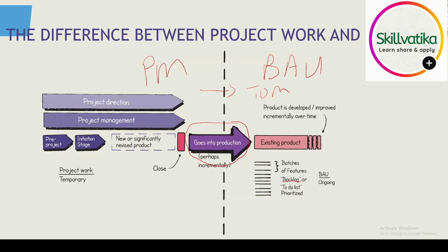If you're a good project manager, your first thing that you want to know is what is it they're trying to do? What is it they're trying to achieve? That's the outcome. What would we be able to provide to them that would enable them to achieve that? That's the output. So an output is a deliverable, and an outcome is the use of that deliverable to achieve the stated outcome. Notice how often I've said this. Very important concept.